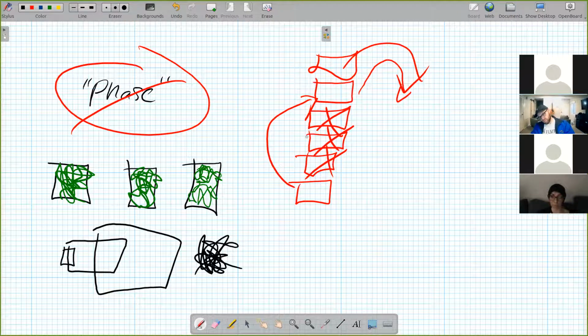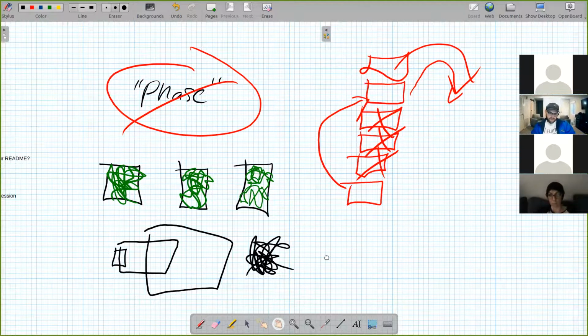You want to catch the really big stuff on the first pass, and then on subsequent passes, you want to get increasingly more detailed things. And it's only when you're actually working on something that you want to bring the mesh through. That's a way healthier way to think about agile requirements.